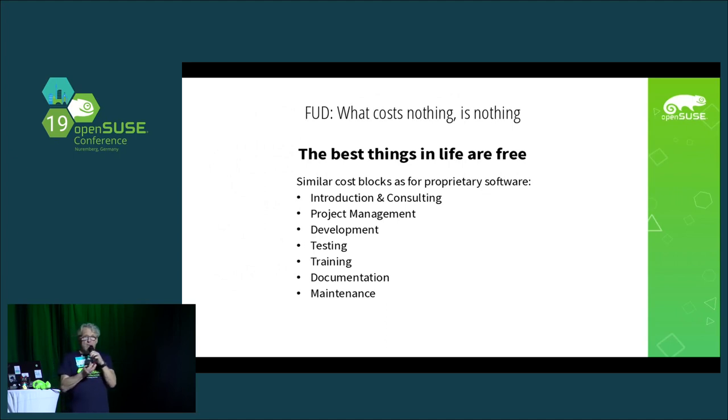Finally, once the software is introduced, you usually have 2 weeks, 4 weeks, 8 weeks, a so-called hypercare phase, where the project team stays on site and makes sure that upcoming issues are solved in a quick time. And after this hypercare phase is finished, you hand this over to the maintenance team. And yeah, maintaining a running software is also something where you have to allocate a little bit of budget for.